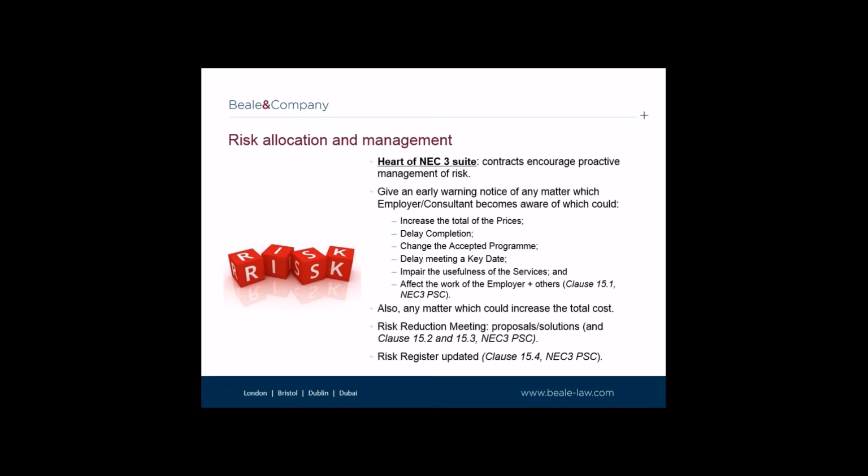The next section of this webinar is going to focus on those provisions which, in my view, go to the heart of the PSC, and the fact that the form of contracts encourages the proactive management of risks arising under it. A good example of this is the early warning notice regime provided in clause 15. This provides that the employer and the consultant must give an early warning notice to the other as soon as it becomes aware of any matter which could increase the total of the prices, delay completion, change the program, delay the meeting of a key date, impair the usefulness of the services to the employer, or affect the work of the employer and others.